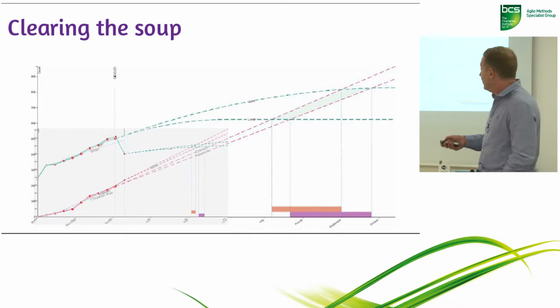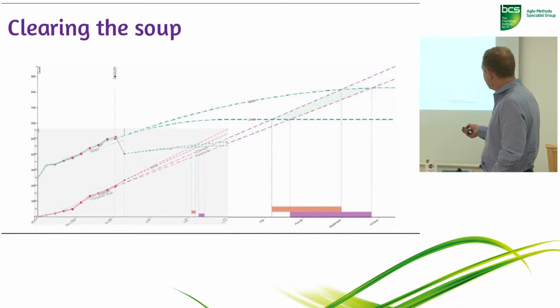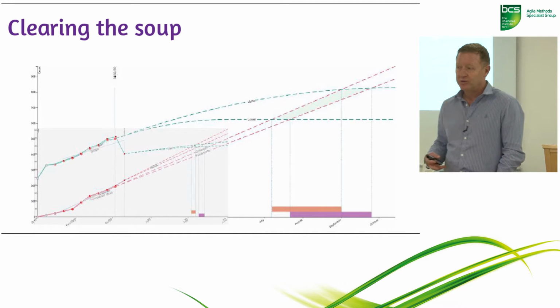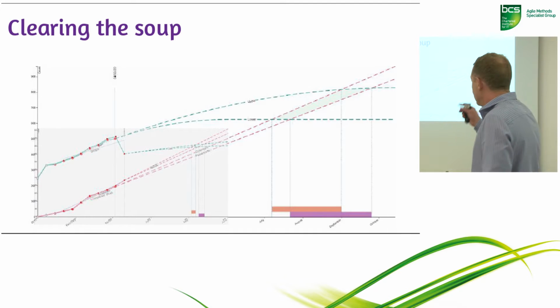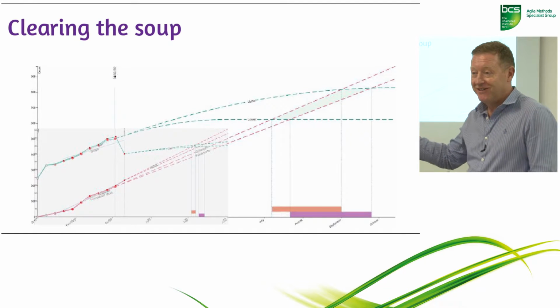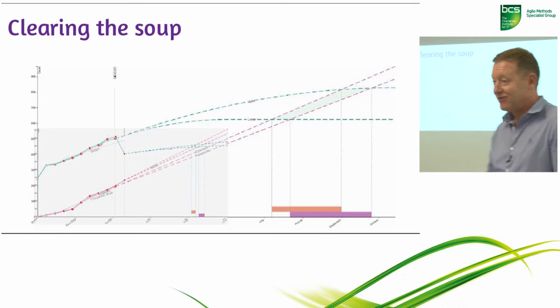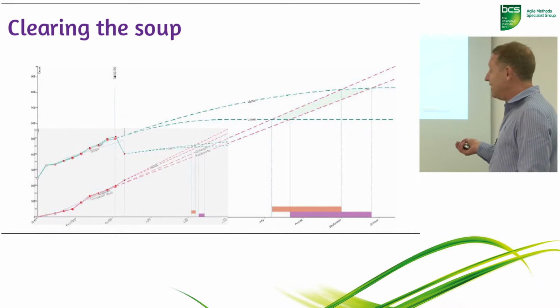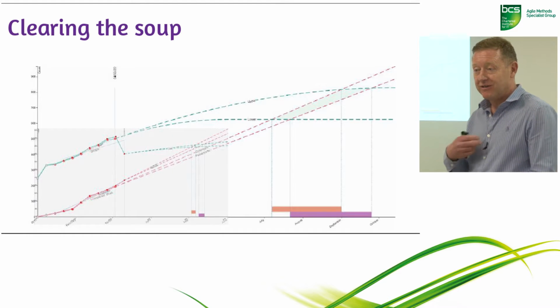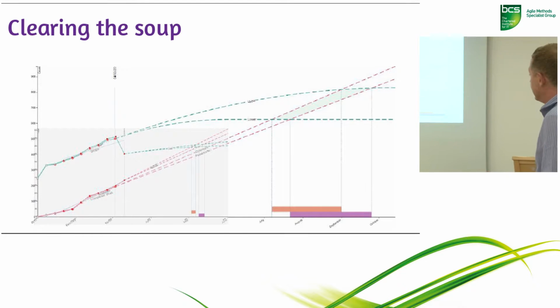So the way to read that is you've got an optimistic throughput, the higher line, and you've got a lower level of scope, and where those intersect gives you your earliest possible date. Now, we can challenge and question both the numbers, and we did. We kept going back, and we had to refine some of the reporting to make sure that these numbers actually withstood and could be tested by the people in the team.